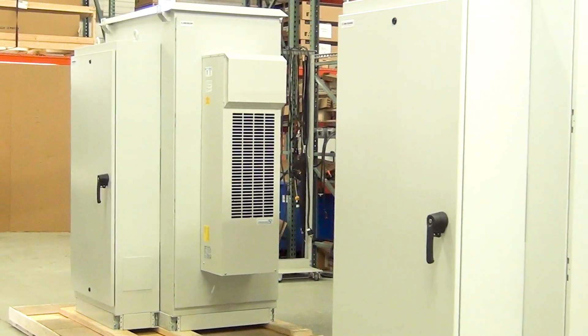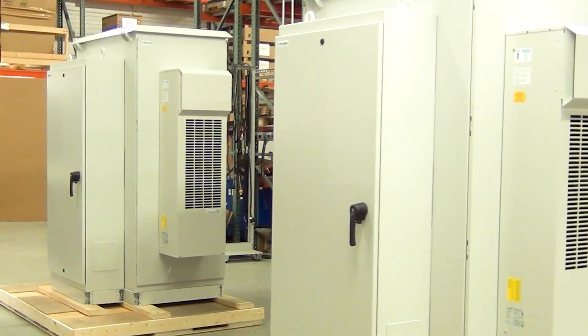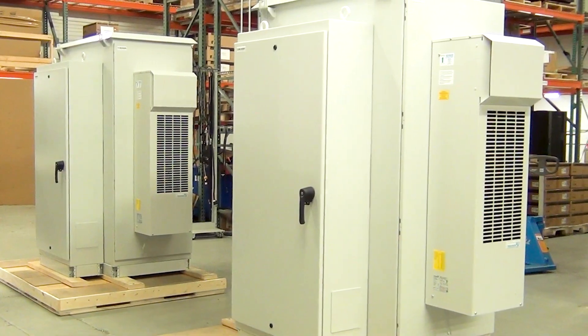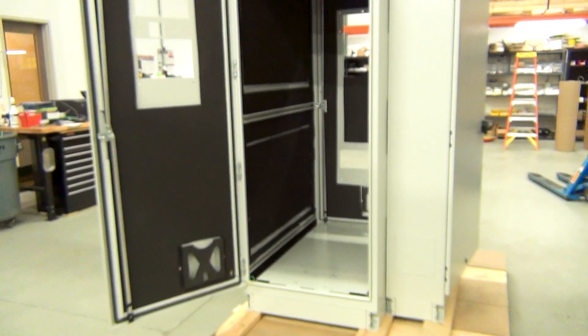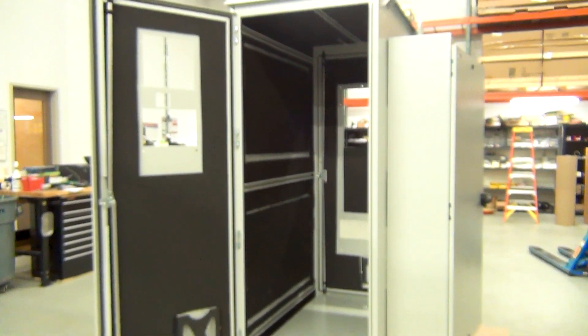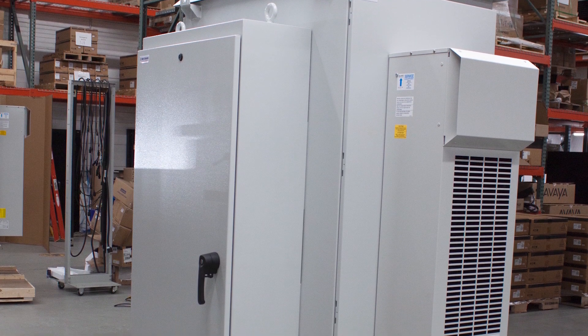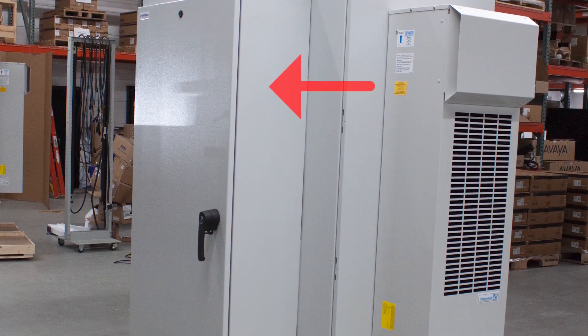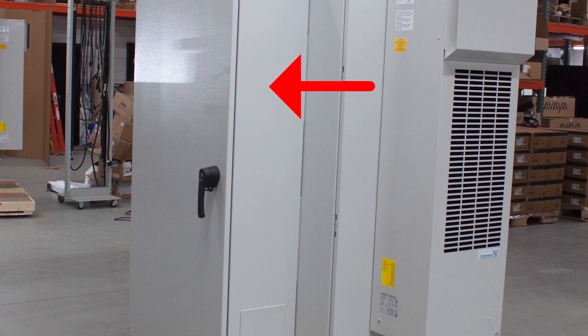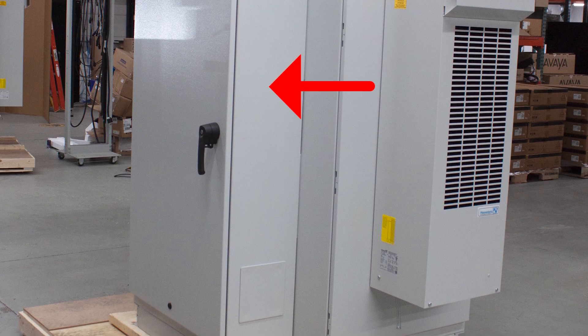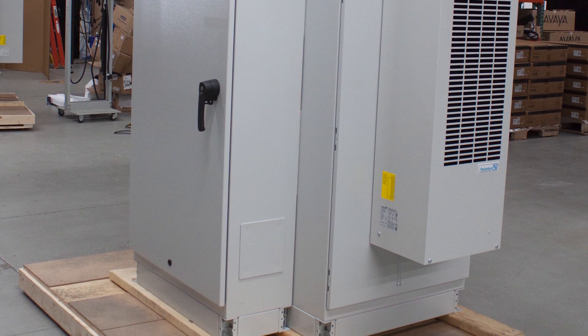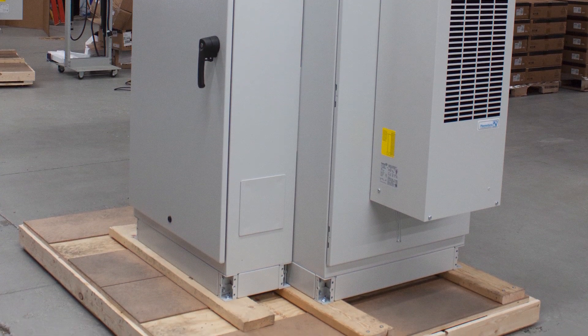Our team started this project with two custom Type 4 sealed enclosures that were built to project-specific dimensions to house a UPS and a standalone enclosure to house the maintenance bypass panel. Having separate enclosures ensures that if the UPS has a failure, the bypass enclosure can be unbolted from the UPS enclosure, then the UPS enclosure can be replaced while the load remains online throughout the replacement process.